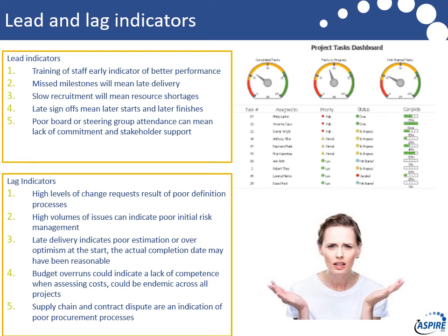A massive problem is late sign-offs, right? This is the business case process is controlled by finance, and nobody's really considering the implications of a late approval of a business case. And it gets approved 6 months late, but nobody ever changes the milestones and stage gates to put them back 6 months, because apparently a miracle will happen. And that's all down to you, program managers. You're going to do that miracle.